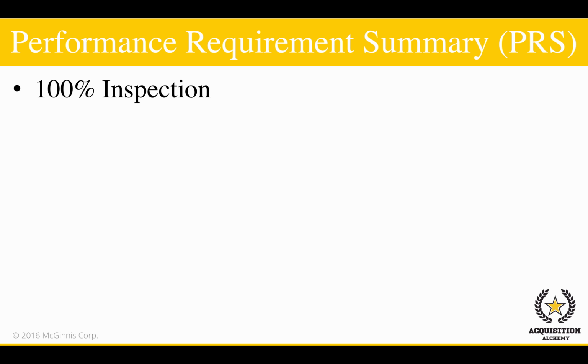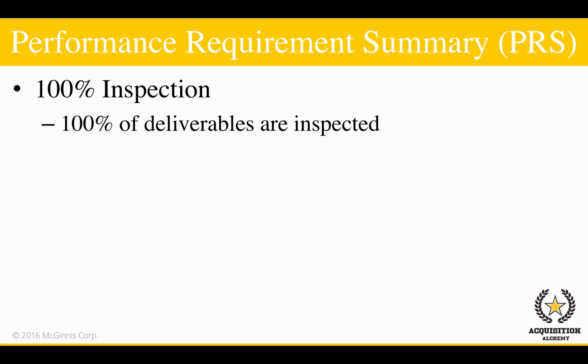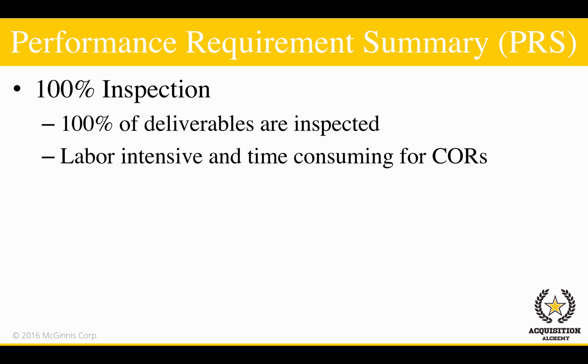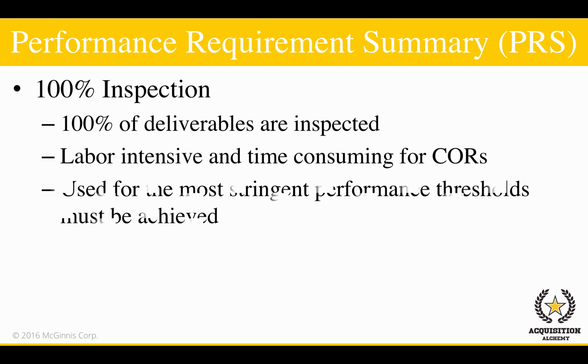100% inspection. Just as the title suggests, 100% of all the contractor's deliverables are inspected. Because 100% inspection is labor-intensive and time-consuming for Corps or other government inspectors, 100% inspection should only be used when the most stringent performance thresholds must be achieved.